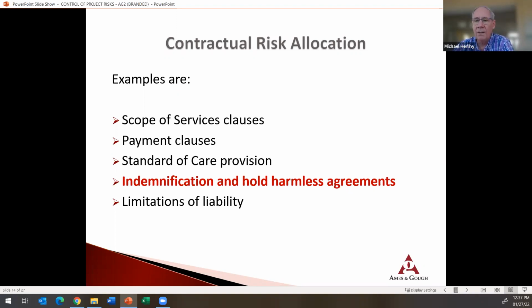What are you going to do about it? You're going to have to sue him. And so you're the one bringing the claim, and you're the one that has to hire the lawyer to bring the claim, and you're not covered by insurance for that, unless the owner kicks back and says, I'm now holding you responsible for this error or omission. You're really filing a payment action is what you're doing if they do that holdback. And so you don't want to be in that position and spending the legal money to do that.